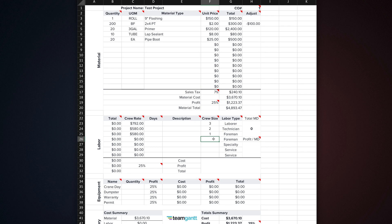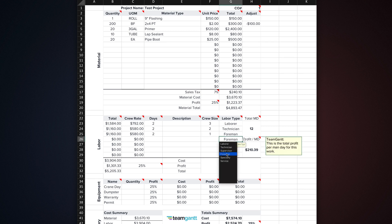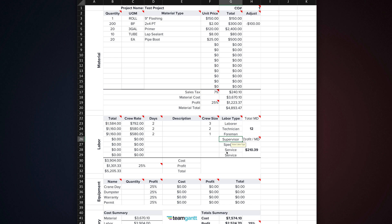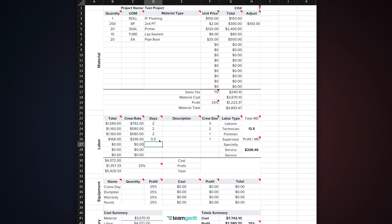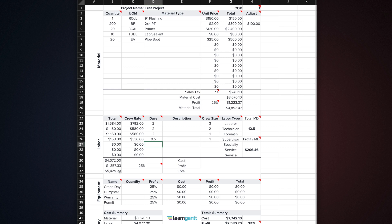Once again, this is currently dummy data that I input. I'll show you how to edit it shortly. So let's say you have a crew working on the change order work for two days. It may consist of three laborers, two technicians, and one foreman. Select those labor types from the drop-downs in that column. Input the quantity of each labor type in the crew size column. And input the amount of days you'll need for each labor type's crew in the days column. In our case, that's two days for each crew. But say you also want to include a supervisor's time on the project as well. Maybe we only need the supervisor on site for a total of half a day over the duration of the work. Just select Supervisor from the labor type drop-down. Input a crew size of 1 and input 0.5 in the days column. Once you've entered all your labor, you'll see it totaled below. Once again, don't adjust the profit just yet. If you look to the right, you'll see a couple of cells that display the total man days on your change order. You'll also see what your profit is per man day.